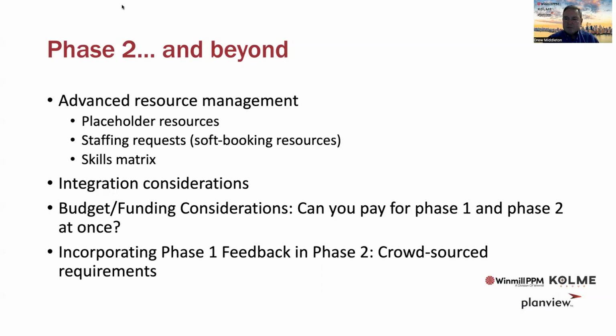We can say, well, projects are not the lowest level of work in the organization. We actually have programs and portfolios, potentially. Not everybody does, but that might be a hierarchy of work that exists in your group. And it could be that those higher objects are funding the projects. So this might be a time to take your PPM to the next level by building those objects out and making sure that we have processes by which your projects are getting the funding from those upstream items.